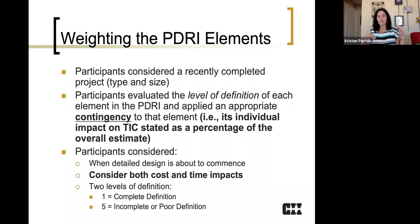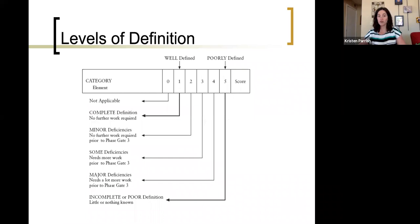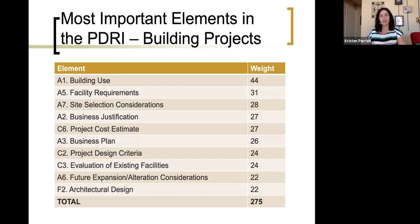So these levels of definition are obviously critical in this process, therefore it's important to understand exactly the guidance that we provide to people. So we would say a level one or definition level one means you have complete definition, there's no further work required. You could also have some deficiencies, so more work would be required prior to stage gate three, which is that stage gate right before detailed design and construction that we looked at earlier. Or you might have incomplete or poor definition, you know very little about this element and that would be of course definition level five.